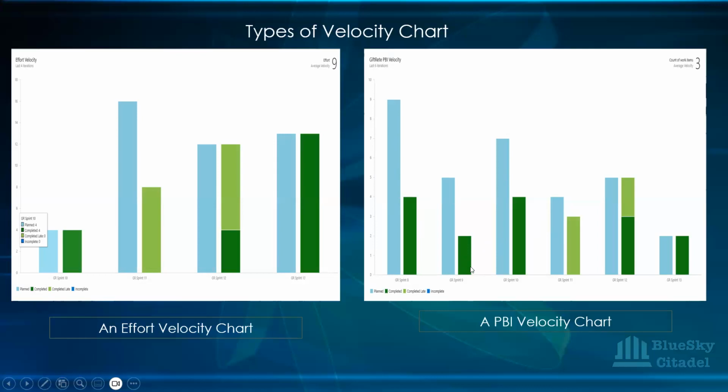And then so you can see a situation of an erratic situation here also. So they're taking it up, they're not finishing. They're still taking it up, they're not finishing. And that means it's possible that they are not following the average velocity. And as you can see, because it's erratic, look at what the average velocity is telling them, that they can only take in 3 stories, which is not really a good performance for the team. And that's because of the erratic situation of their chart.